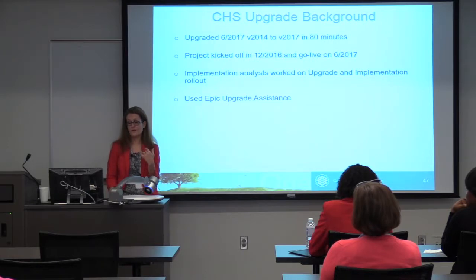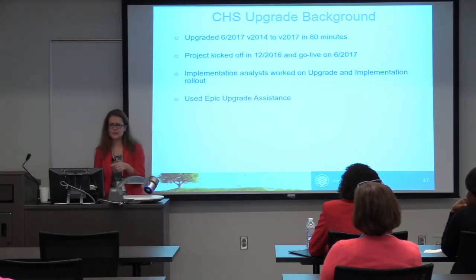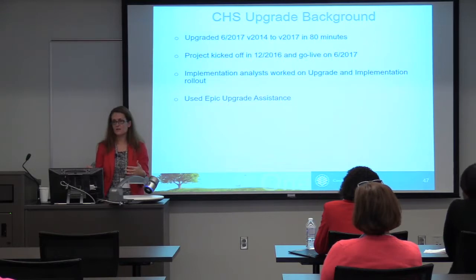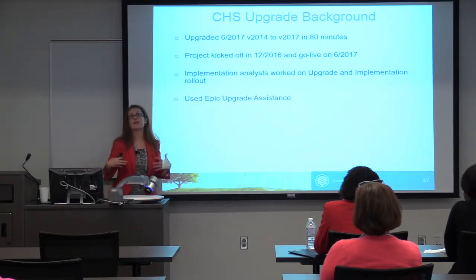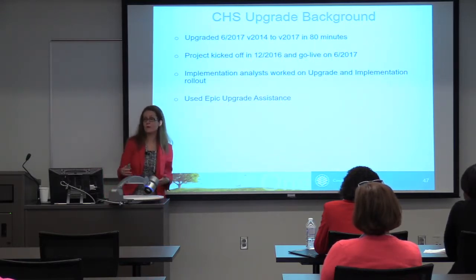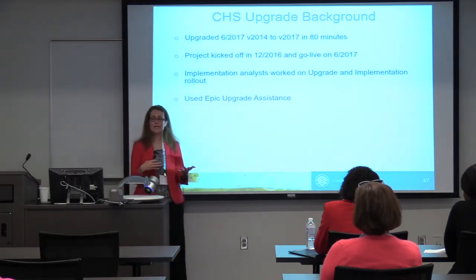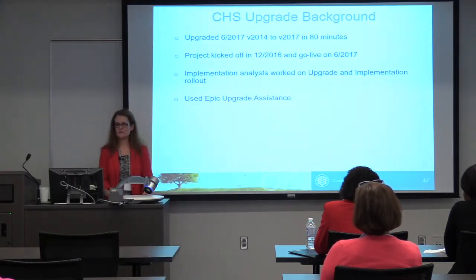So we absolutely did customizations, probably not as much during the upgrade. To be honest, we kind of scaled back a little bit. We only took the things that we absolutely needed just because we were in a time crunch. We had rollouts still going on. So, I don't think we took everything we could have taken. That probably would have taken more work from us and more customizations. We kind of scaled back a little bit on just what the necessities were.